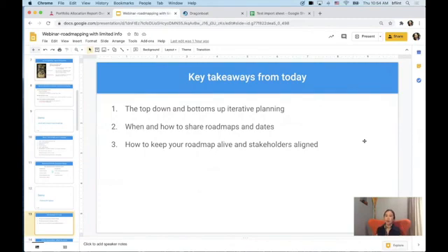And when and how to share your product and roadmap updates: make sure you have done some high-level planning and alignment in terms of the buckets of strategic drivers and your high-level feature sizing, so you know what can be done. So there's no unnecessary excitement when things are quote-unquote delayed, even though we never really communicated to that. And also how we communicate dates in terms of bigger time frames, right? Talk about quarters and months, not necessarily a date.